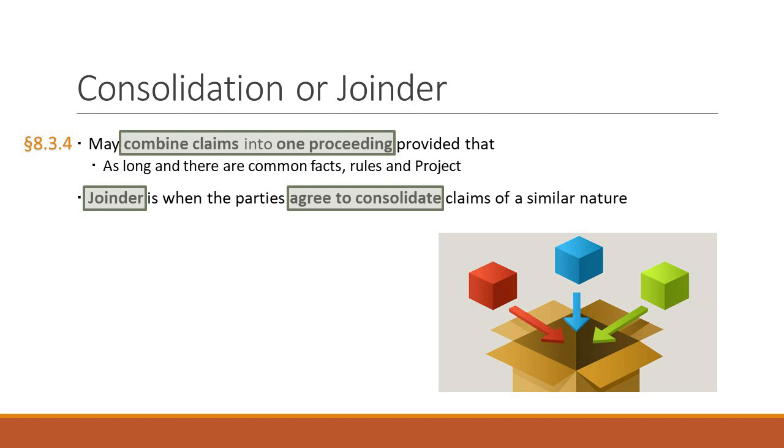And in the construction arbitration, those panel members, because it's separate, may say, well, the contractor was only responsible for 40% and 60% the architect. Now I have two inconsistent decisions because I don't have a joinder clause. So it's important, especially in construction, to keep everybody together. So this is important just procedurally, so everybody's at the dance at the same time.